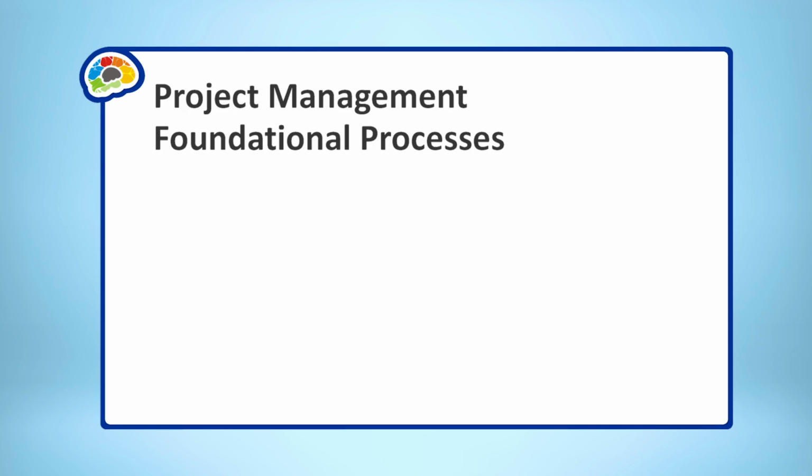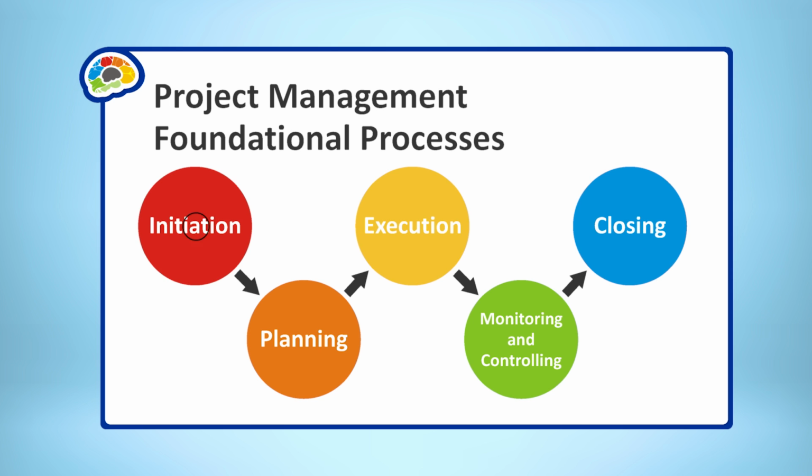Right. So before we jump in and create our own charter, what I'd like to do is show you a little bit about the project management foundational processes. So initiation typically is when the charter is created. This will be when we decide, hey, this is a real project, it is funded, and we're moving forward with it. And when we create the charter, we come out of initiation and into planning.